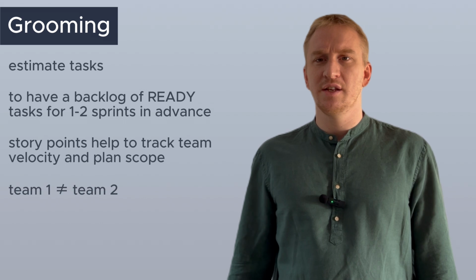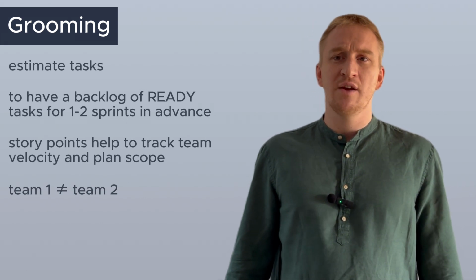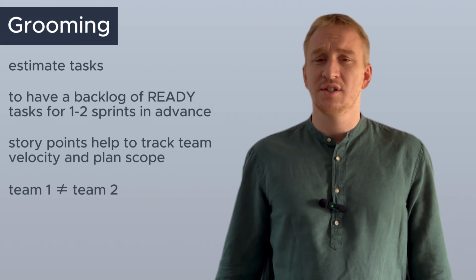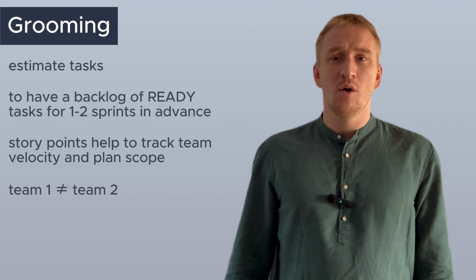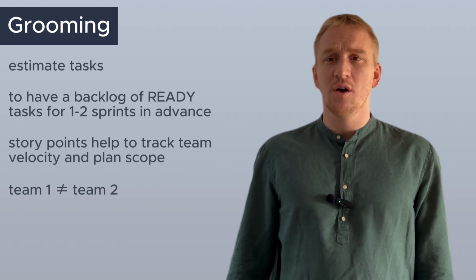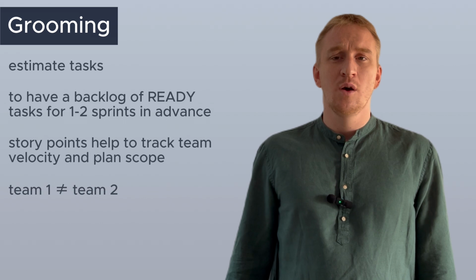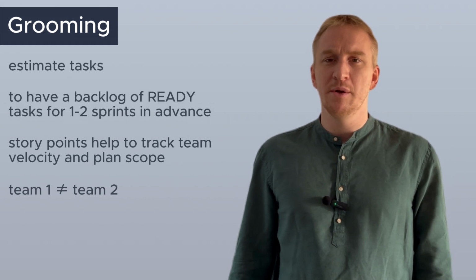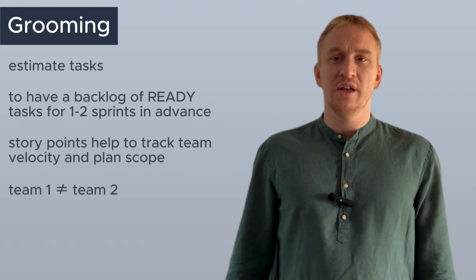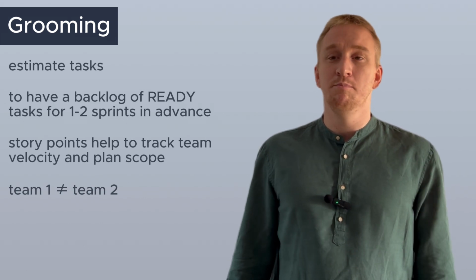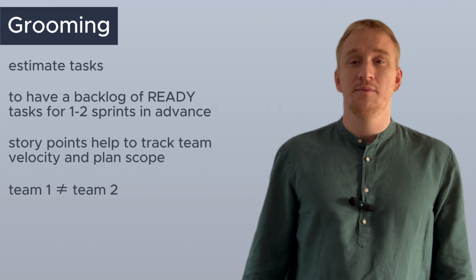Not all required fields are described, and not all logic is explained, for example, whether we should have validation on the forms, etc. It means that only one developer is figuring out details of one ticket, while designers, quality assurance guys, the project manager, and other team members are just sitting on the call and listening to the conversation between the business analyst and the developer. It's just a waste of time of all team members.